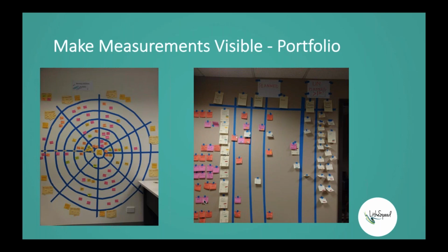Awesome. I hope that answers your questions. Next question here. What have you seen be the most successful measure to look at? I think the one that I like the most is just overall cycle time. How long does it take the organization from when it decides it wants to do something until I'm able to launch that feature or that capability or that functionality into production, and finding out where those bottlenecks are en route.